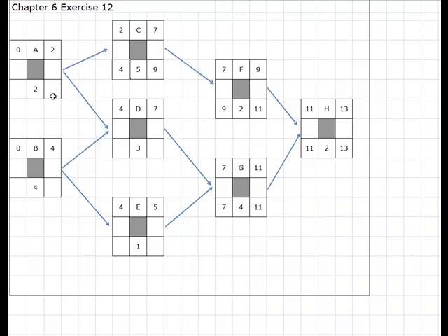Okay. I can't move down to this one yet because I don't know what this one is. It could be a lower value, so I'd want to take it. So now I've got to come back and calculate through this side of the network. And now I can see that these values are the same, so I'm going to take 4. And 4 minus 2 is 2. And down here, I'm going to end up taking the smaller value, so 4. 4 minus 4 is 0.